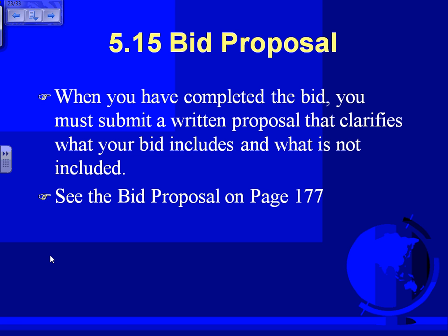Acceptance of proposal, then this proposal is accepted if it's signed. It says this proposal may be withdrawn if not accepted within 15 days. I don't want you to put this proposal on your desk for 2 years and sign it, and then say, okay, now you guys send it to us, right? It's not. Within 15 days, it's not accepted. But why? Everybody knows why. The price change, everything changes. And who's going to be accepting it and the date and so forth?